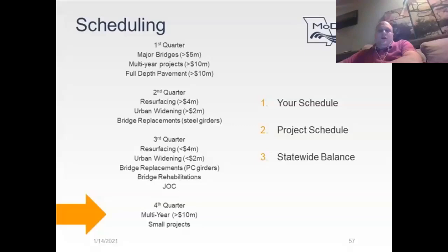Also, having a core team meeting, as discussed earlier, and discussing the schedule is great. See if there's enough time to get all the right-of-way cleared and the NEPA process done, and determine if there are any local festivals, parades, and fairs that will hinder the construction of the project, or anything else that can impact the schedule of the project.